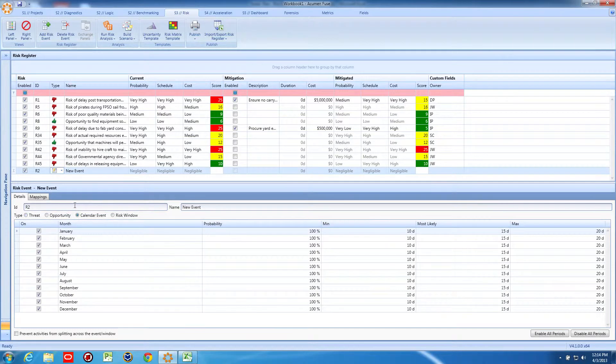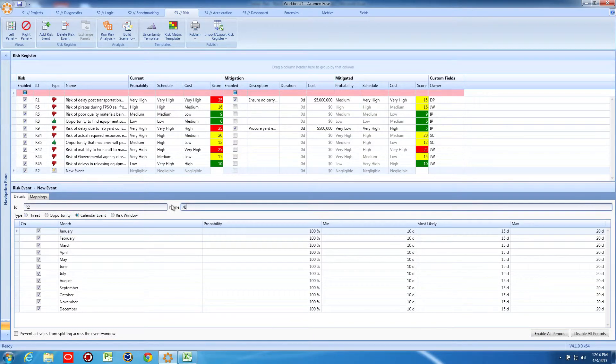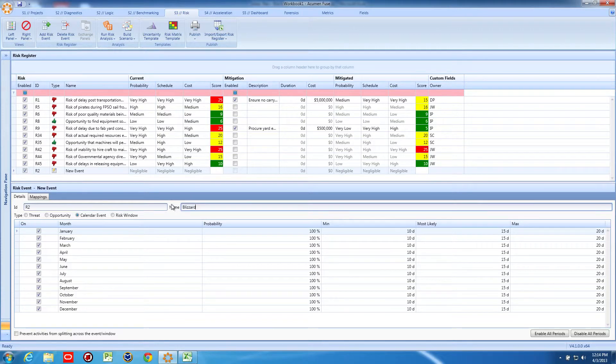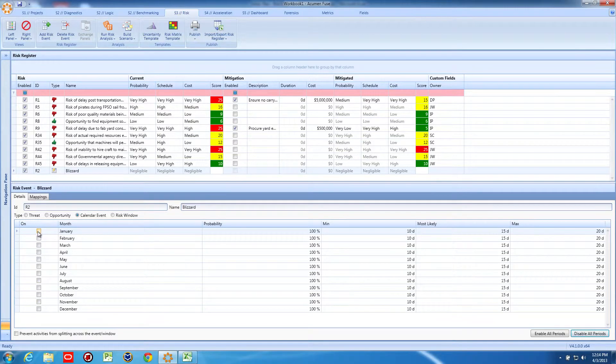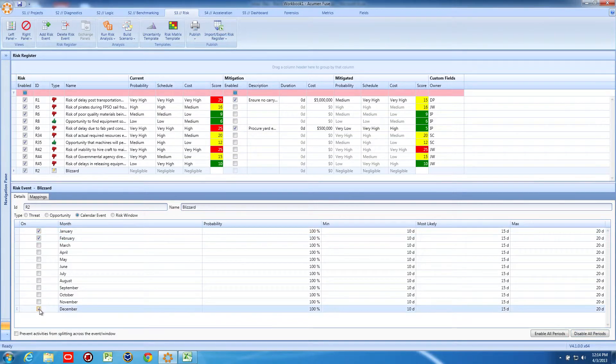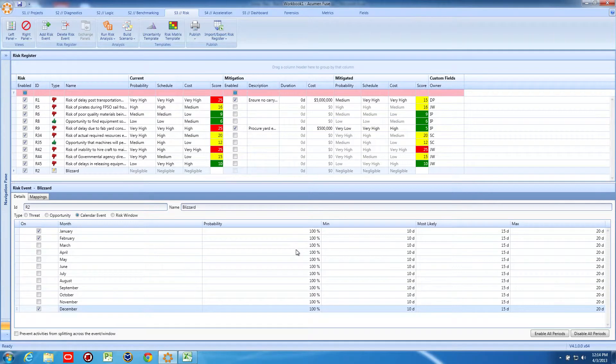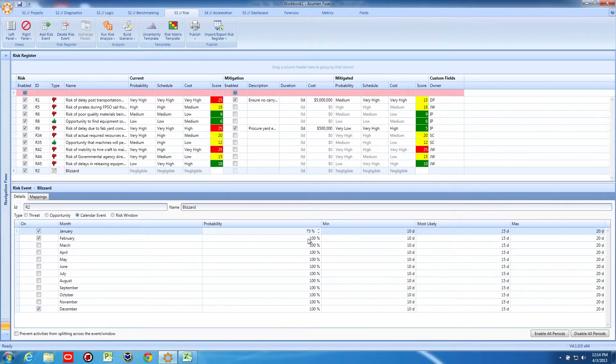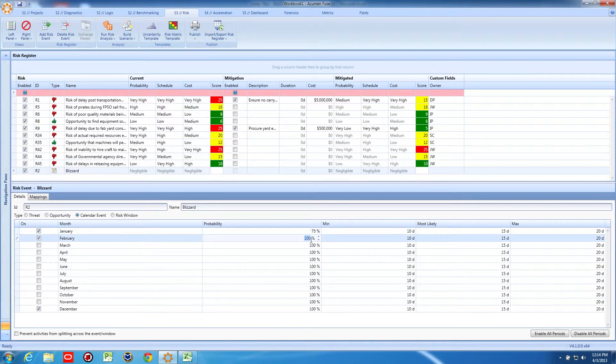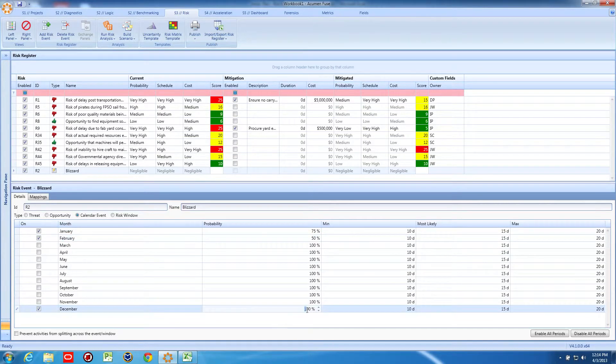Let's add an item. Let's add a calendar event for the possibility of a blizzard during the winter months of our project. First, we'll select the months that have a probability of a blizzard. Then for each month, we can determine the probability of blizzard impact and the potential duration of the impact using a three-point estimate.